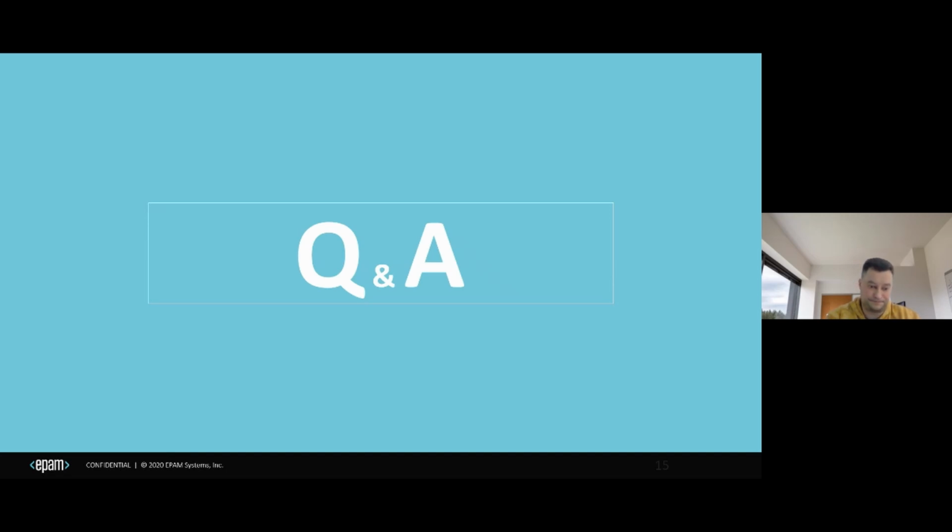You know that if you have some kind of differences, huge differences, it means a couple of things, guys. It means that you need to investigate much more. Based on the comments from your team members, why did this or that team member provide the extreme estimation? Why did this difference happen in their heads? This is the first cornerstone question. You need to understand the arguments that you are going to provide to the team for the next discussion.